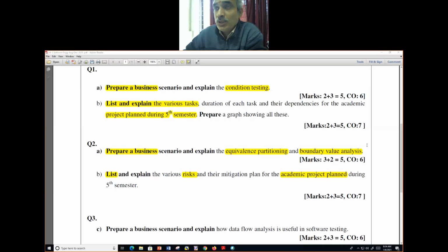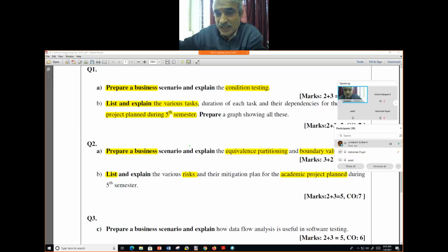Are you getting this? For example, I'm doing brain signal analysis. I need to procure a device to capture brain signals, and I need to import it. Now the risk is very severe because I have to import that one. There is no guarantee that I get it in the next 2 months. Are you getting it? Ashish? Yes, sir. Now, the various risks associated with my academic project title so and so are listed below along with the mitigation plan. That's all.